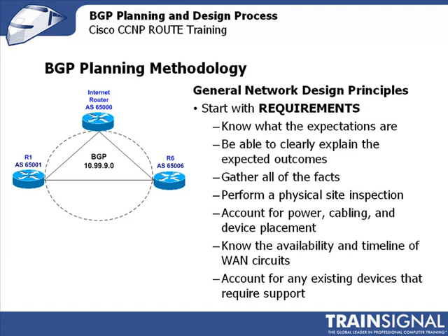Make sure that you interview or talk to enough people, we call them stakeholders, to make sure that you understand what all the facts are involved, the number of sites and other things. Perform a physical site inspection so that there are no surprises. If it's a facility that you've never been to, it's even more important to do a physical inspection, as there are all sorts of surprises that can await you that you can avoid when you actually go to do the installation, test, and turn up. Account for power, cabling, and device placement.